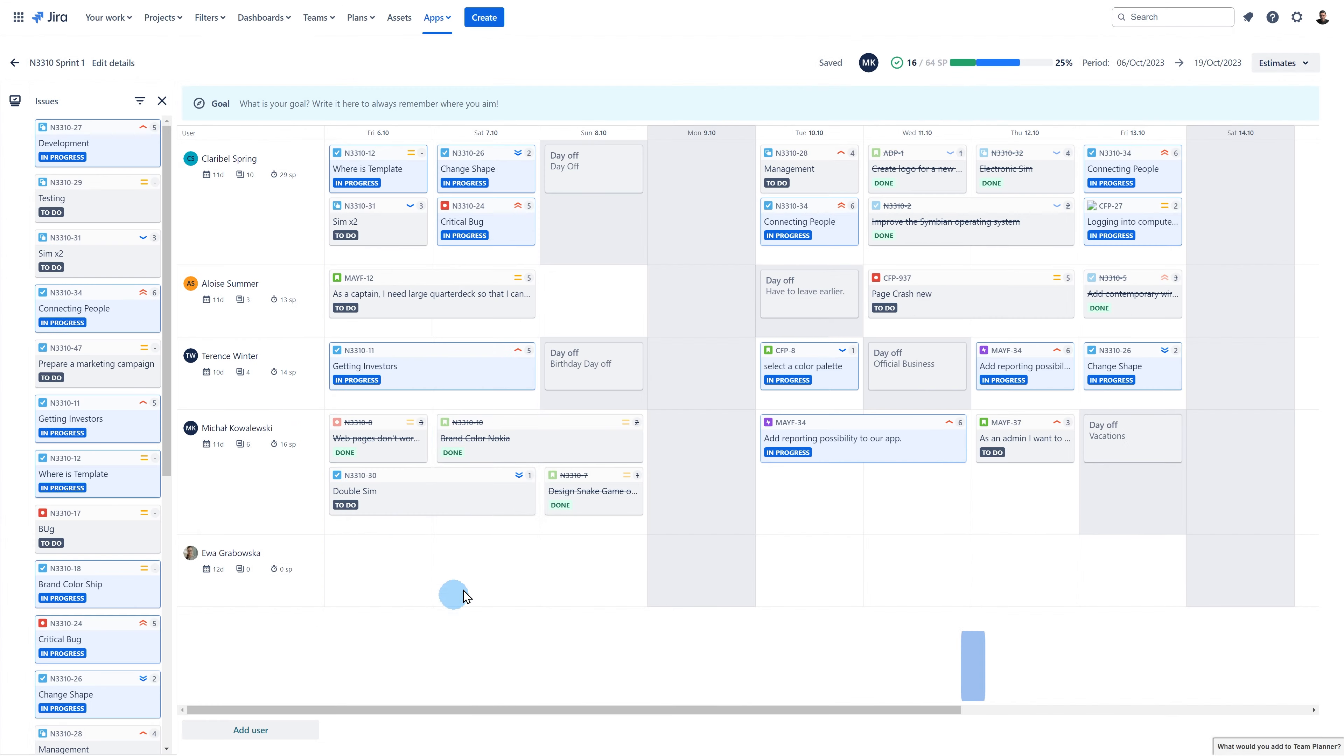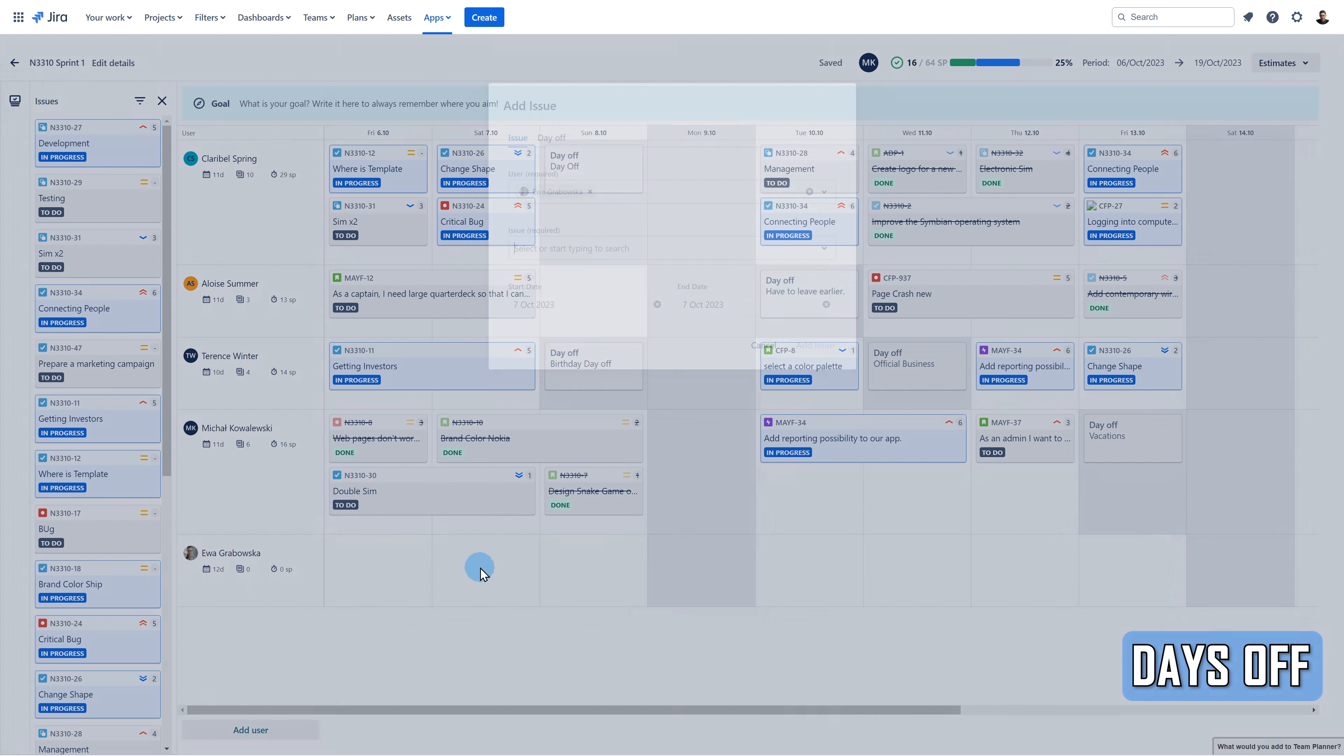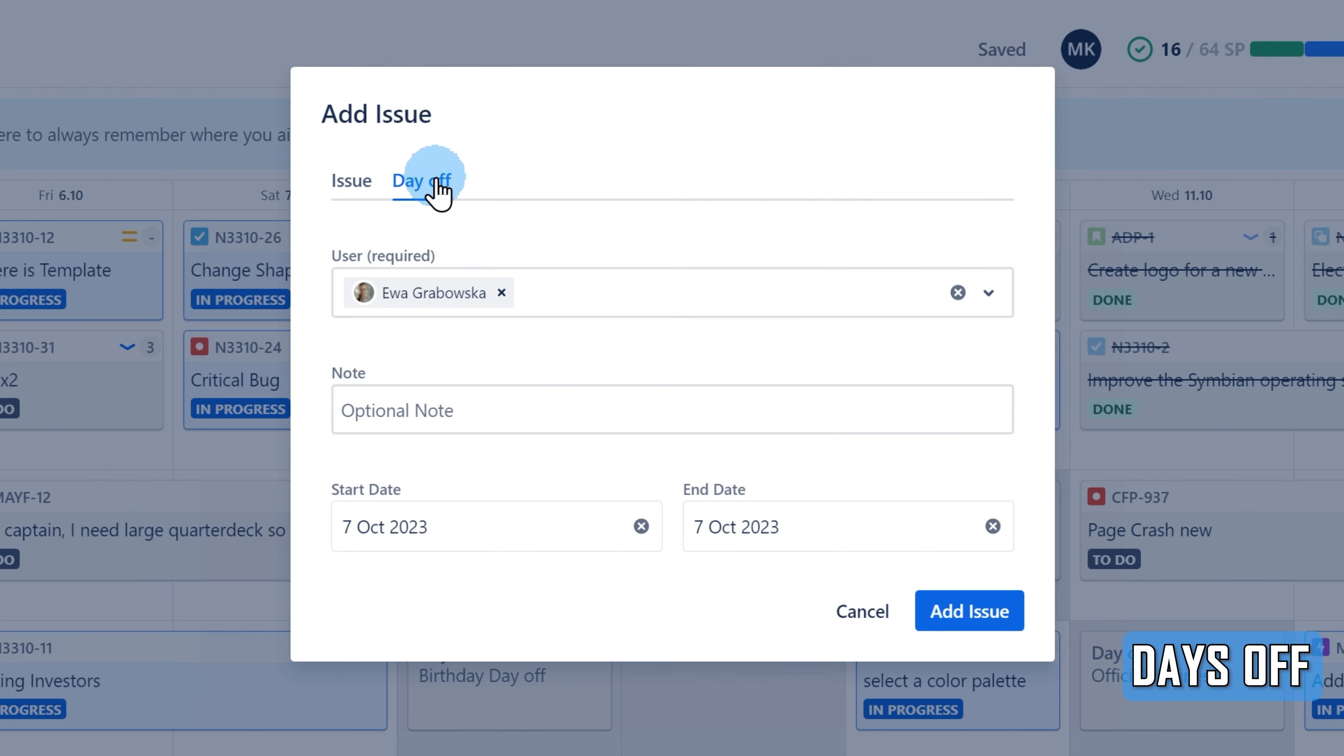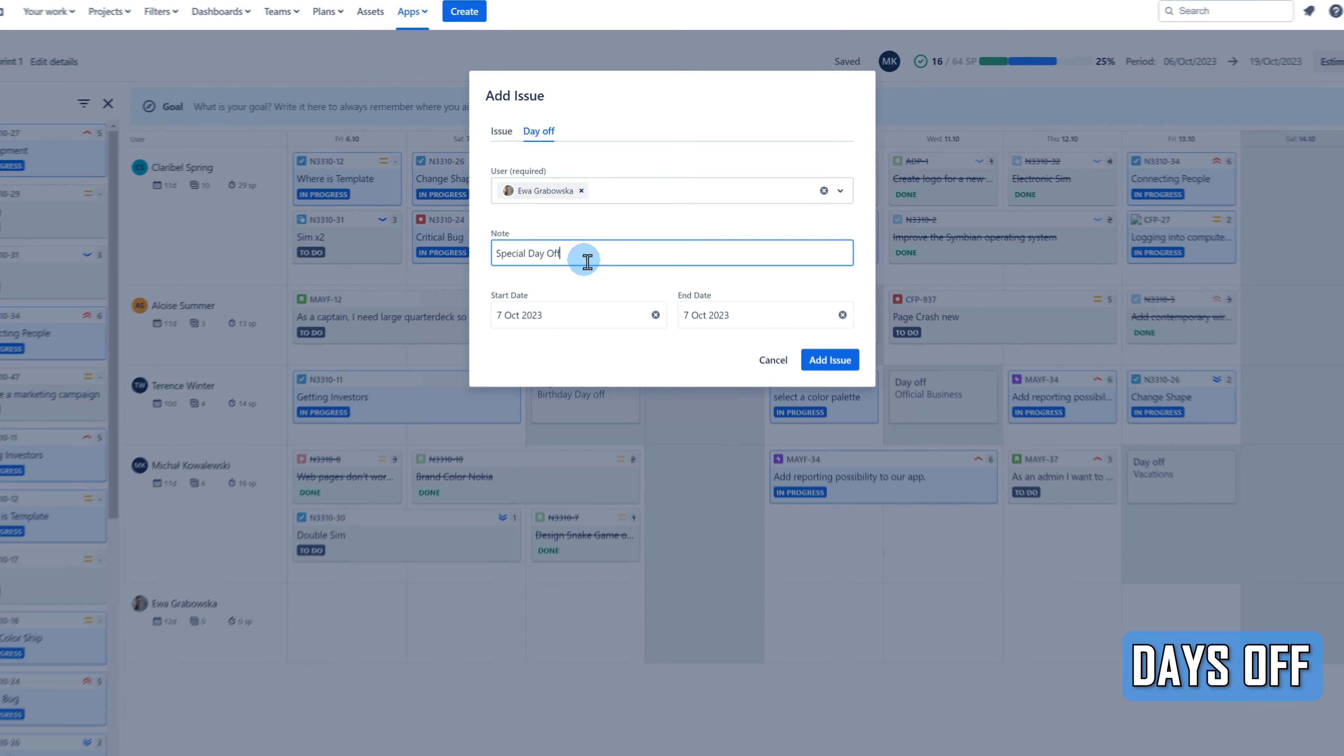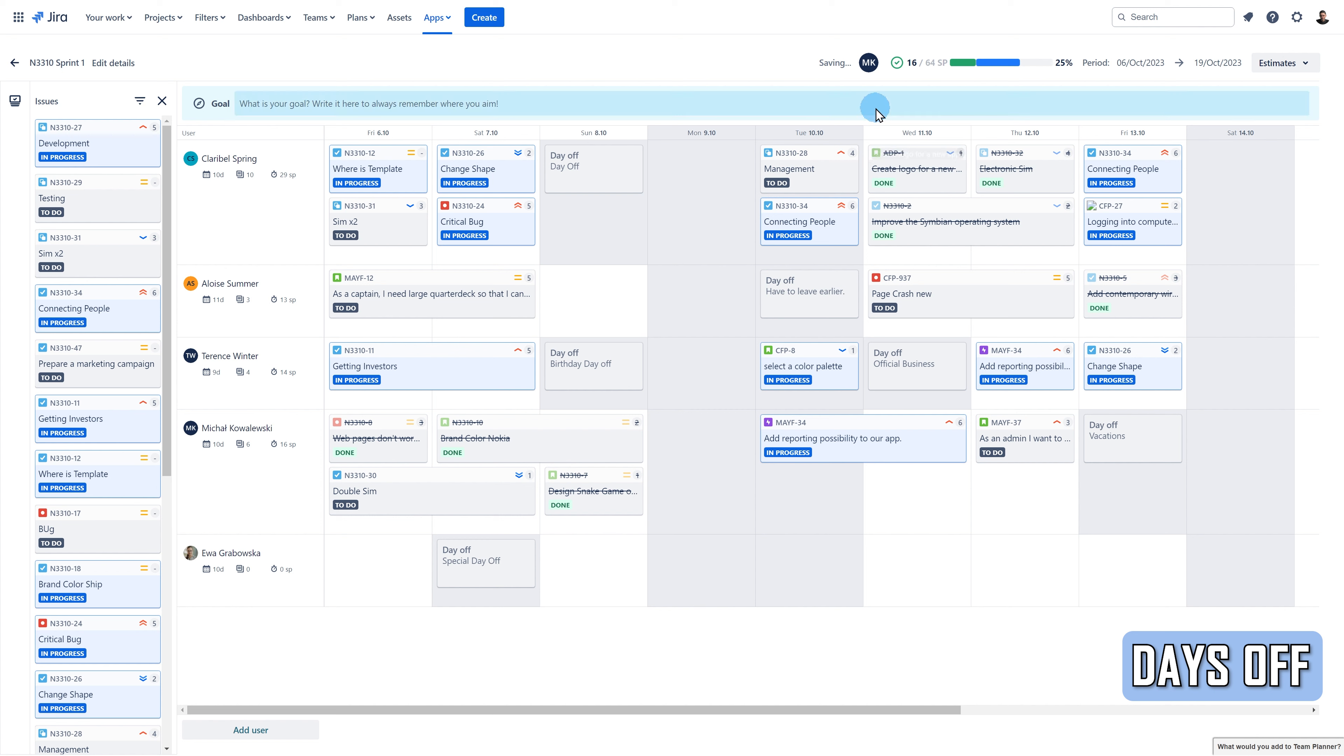We all like to take some holidays. It is useful for other users to know what day a particular user will not be at work. On the plan, you can easily add a day off by clicking on the plus icon. You can also describe the reason behind the day off. You can also mark the whole day as a non-working day by clicking on the three dots next to the date and selecting Mark as non-working day.